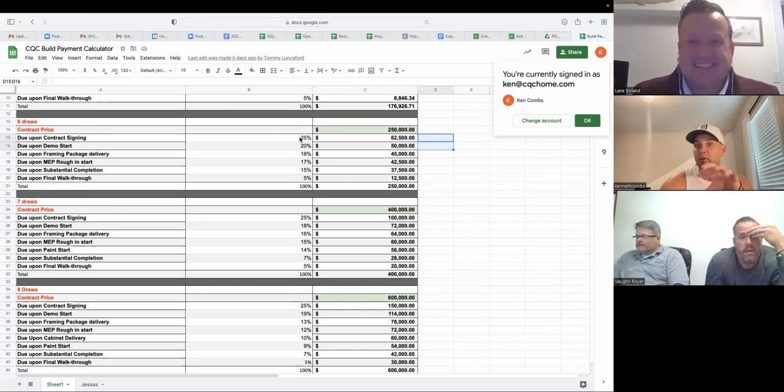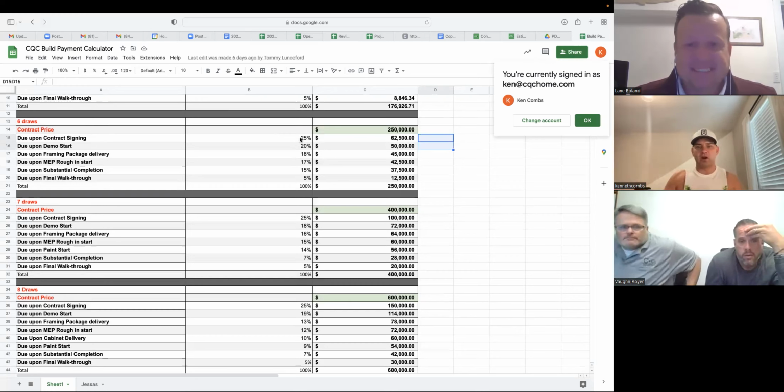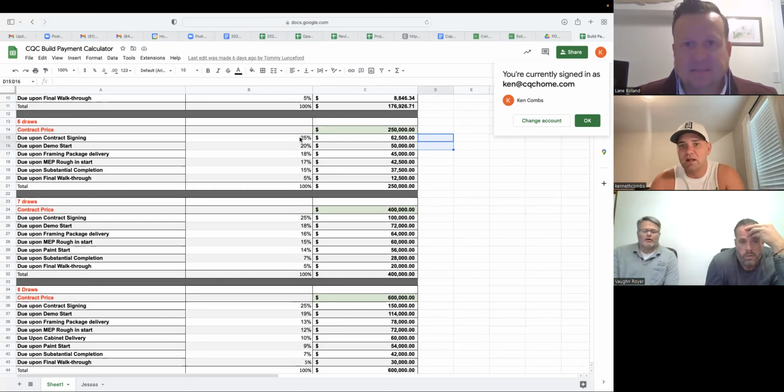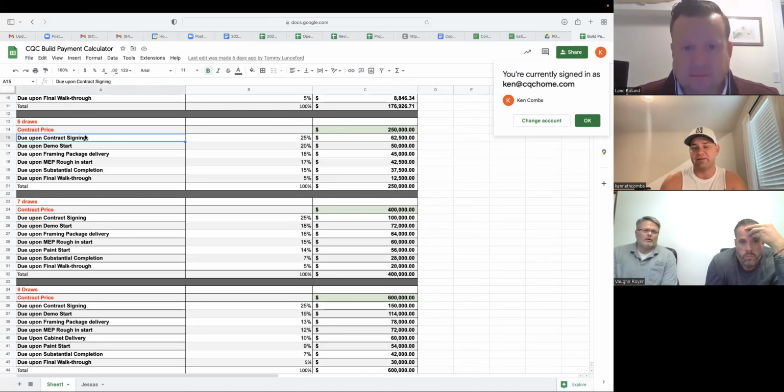Now, we will have ordered materials and stuff, but almost all of that is on LAR, right? All that stuff's on 30-day, 60-day, 90-day accounts. It's not like we pay it in cash. It's not COD. So we have a majority of their money. And again, everything, if you notice, is something they can't argue with. It's fixed, and it's the beginning of something, not the end of something, where it can be argued with.